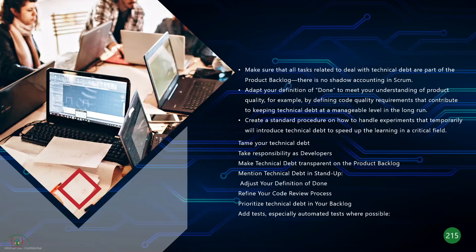The debt has to be part of the product backlog. Create a standard procedure, tame your technical debt — very important. Take responsibility as developers, write good code, and make the debt transfer into the product backlog. You can mention debt in daily standup calls just like you would mention any user story.